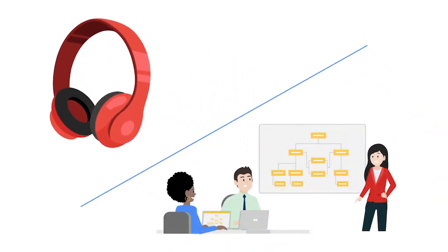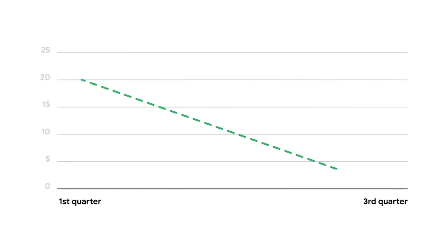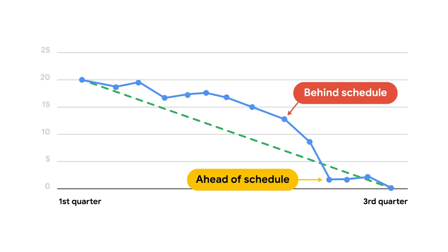For example, let's say you have an ongoing project at a manufacturing company to release a portable home appliance by the third quarter. Your stakeholder is concerned about whether or not you'll meet the deadline. Okay, start by thinking, what data do you have about the project? You know that it's the first quarter and you're already $2,000 over budget. But you also know that you're 30 days ahead of schedule according to your burn-down chart, which measures time against the amount of work done and the amount of work remaining.